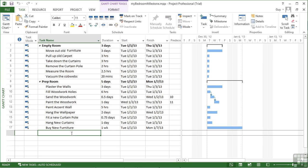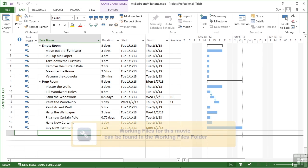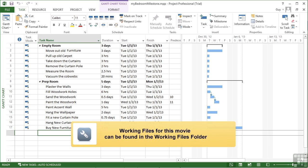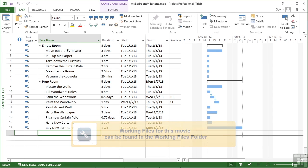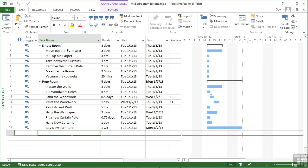In the sample project that we previewed much earlier, we saw some milestone tasks. There are milestones that appear on the Gantt chart as black diamonds. It's quite useful to have milestone tasks, usually at the end of each section — so we might have a milestone at the end of empty room and another milestone at the end of prep room.